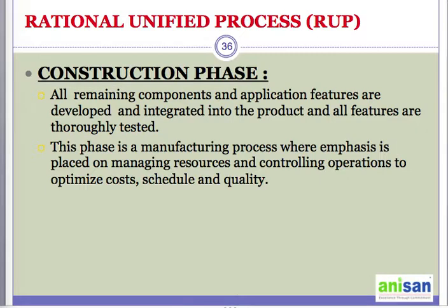For example, you have to check at what time the data will come to you, who will be checking, and if it is automatic checking, what happens if any issues or errors occur and who will be notified. So you have to create that operating model and get approval from all the relevant stakeholders.